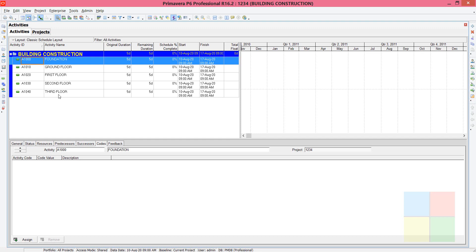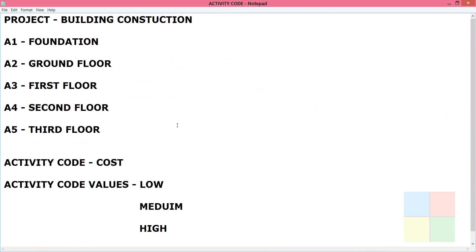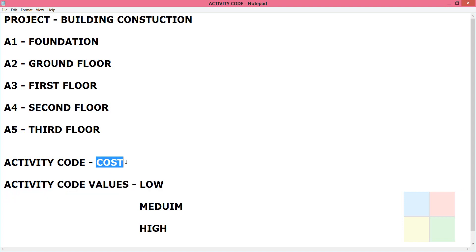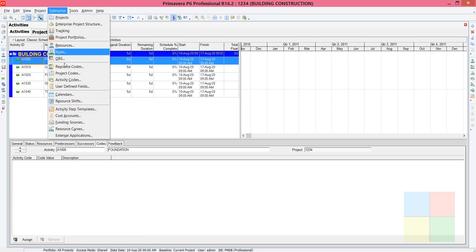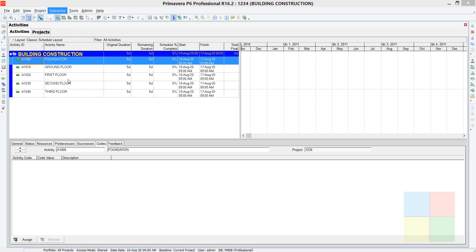Now the next thing is we have to create the activity codes. The activity code is 'Cost', and the three code values that come under it are Low, Medium, and High. Let's create this now. Go to Enterprise in the software, then go to Activity Codes.